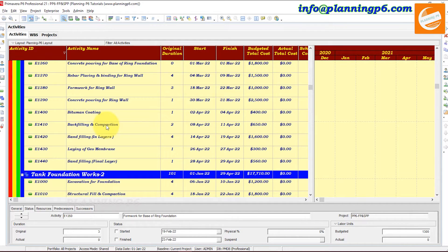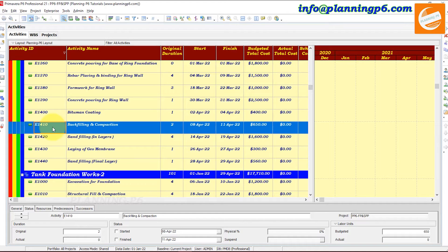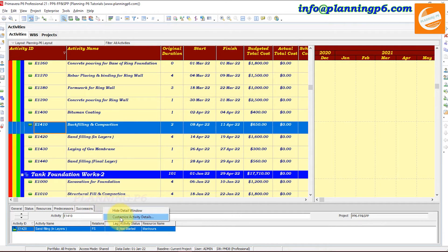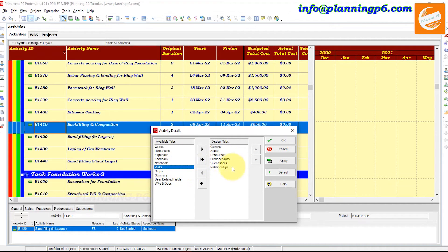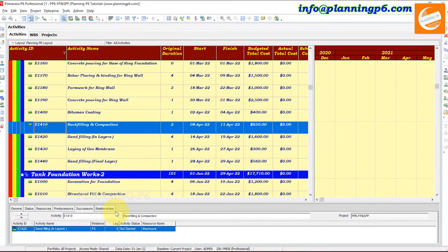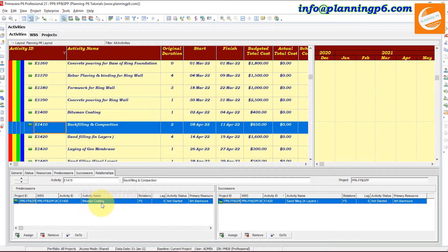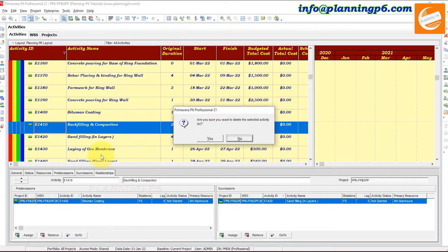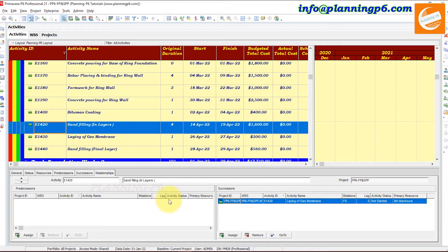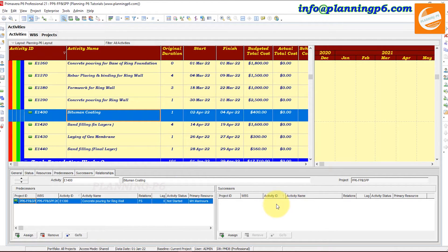Suppose we want to delete this activity and we want the relationships to remain the same. This activity's predecessor is the bitumen coating activity, and its successor is the sand filling in layers activity. However, if we delete this activity, you can see the relationship is removed automatically — this activity now has no predecessor, and that activity has no successor. The relationship has been broken.